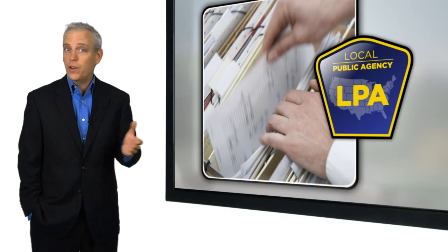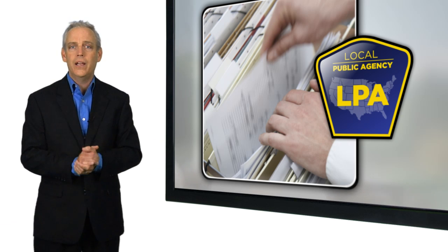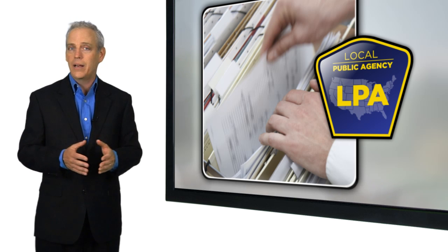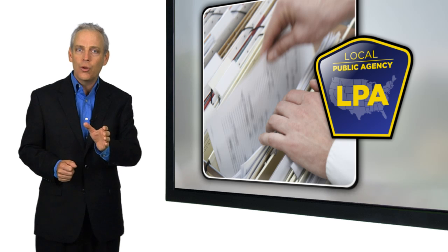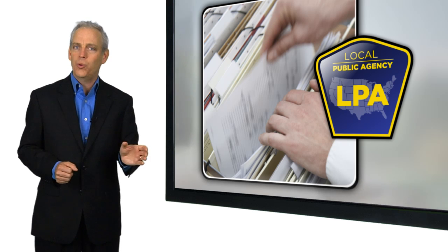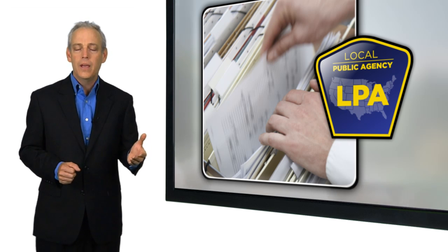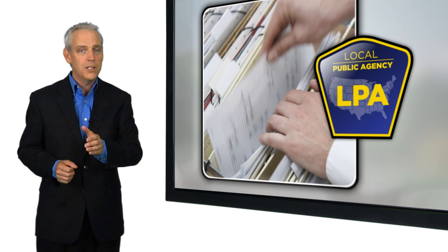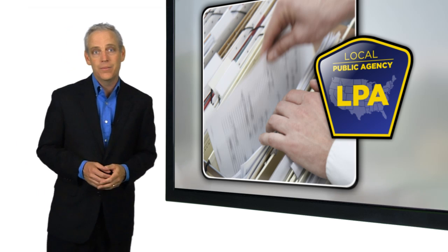Any agency that uses federal aid funds to hire consultants for engineering and design-related services accepts the responsibility to follow the requirements just outlined. Make sure to establish and follow written policies and procedures that detail how a consultant is hired and how the subsequent contract will be administered and monitored. Each state DOT has the oversight responsibility for consultant services procurement and administration activities in that state. As such, the state DOT can help answer any questions prior to contracting with a consultant using federal aid funds, so you can meet all applicable federal and state laws and regulations.